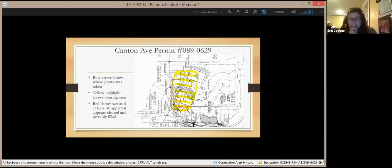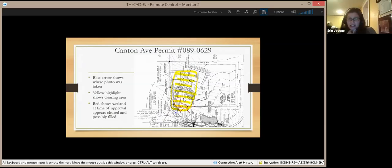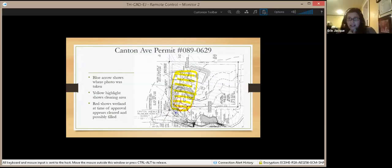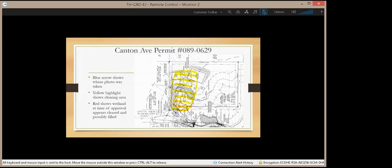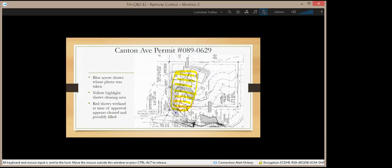I understand what you're saying, but it's a violation of your order of conditions. And the town was never contacted prior to the start of work, which is a requirement of your permit. To have a violation like that, no DEP file number, no pre-construction meeting. When you have a state permit and there are jurisdictional wetland areas, we have to be notified.